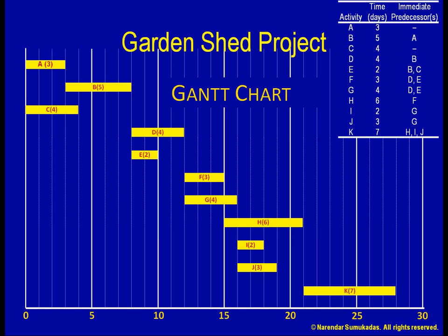For example, activities F and G can run in parallel as far as the precedence requirements are concerned. However, suppose both of these activities require a particular tool and I own only one such tool. Unless I can rent another tool, the activities will have to become sequential. Likewise, even if I have enough tools, if both activities involve the same nook in the shed, I can't possibly fit two individuals in that space at the same time.